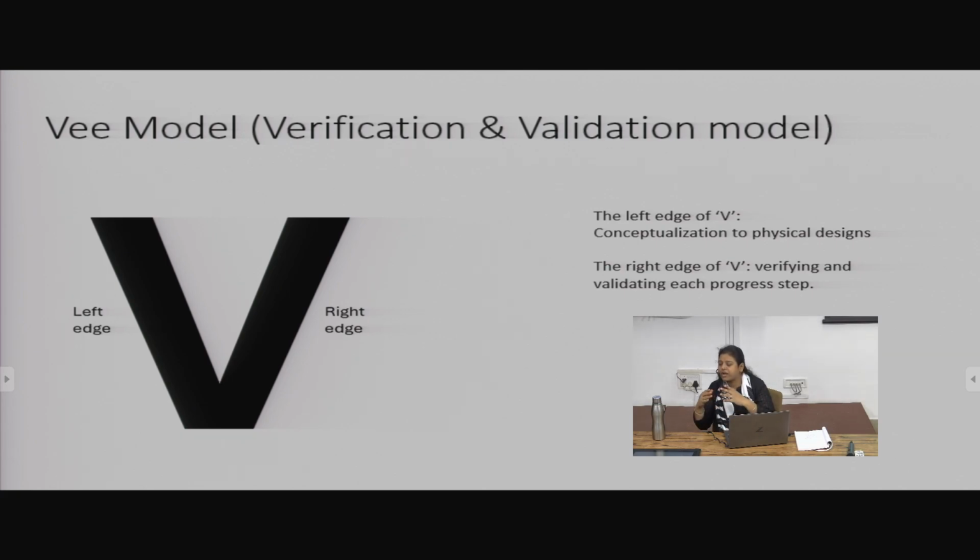Let us say you wanted to create a bottle of 1.5 liters, right? But you created a bottle that is 100 or 150 ml less in capacity, and now your stakeholder is saying it won't work. What will you do? You have to scrap your manufactured product. So the risk is very, very high when you are manufacturing products. Hence verification and validation is more focused in manufacturing systems.